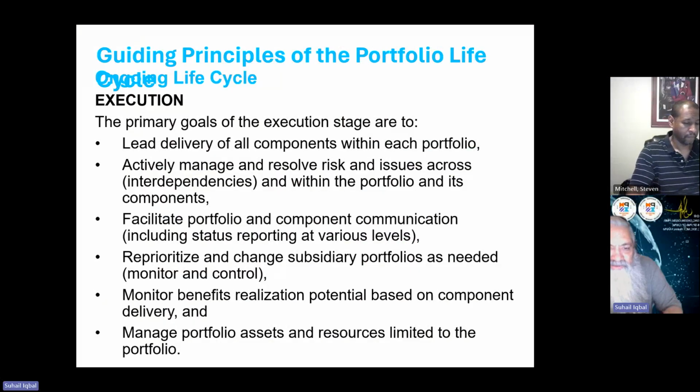Execution, and we said that whatever we have planned in our portfolio management plan, we are now putting it to action. We are executing those things. But execution means that only what is in the plan can be done. If you want to do something different from the plan, then that plan has to be amended accordingly first. You will only execute what is in the plan. You can't do things which are not there in the plan.